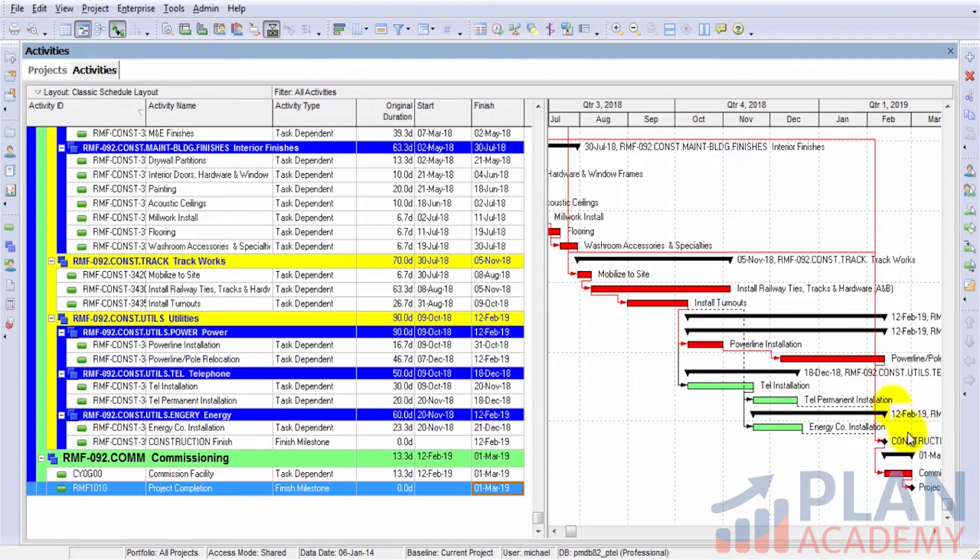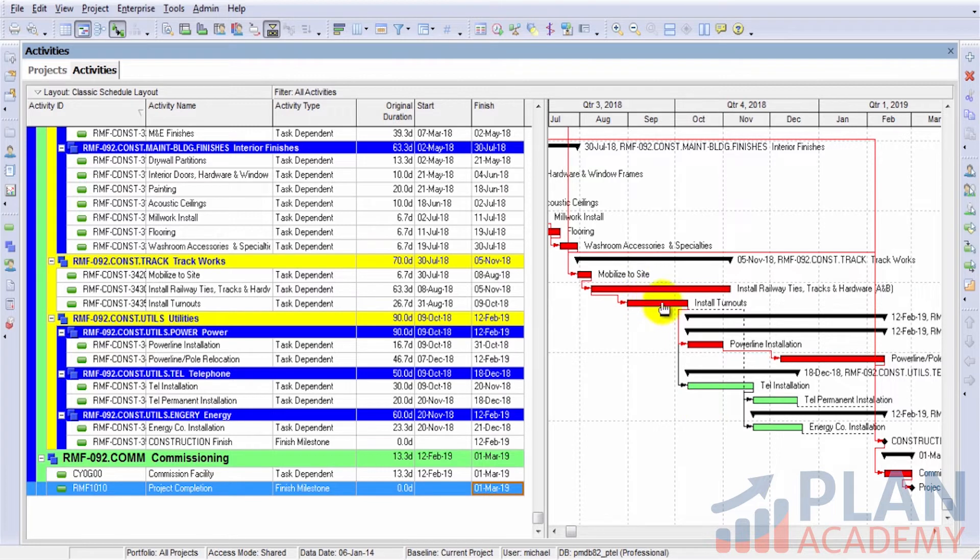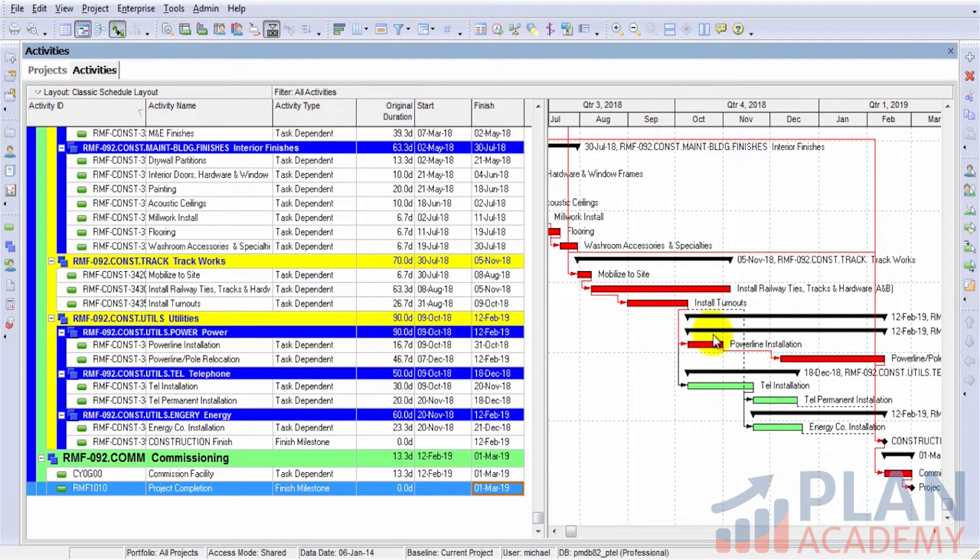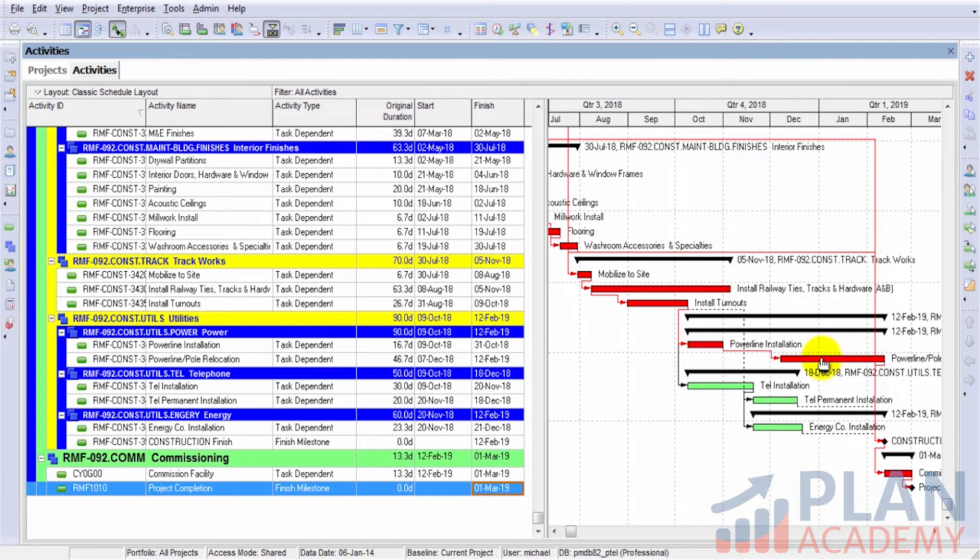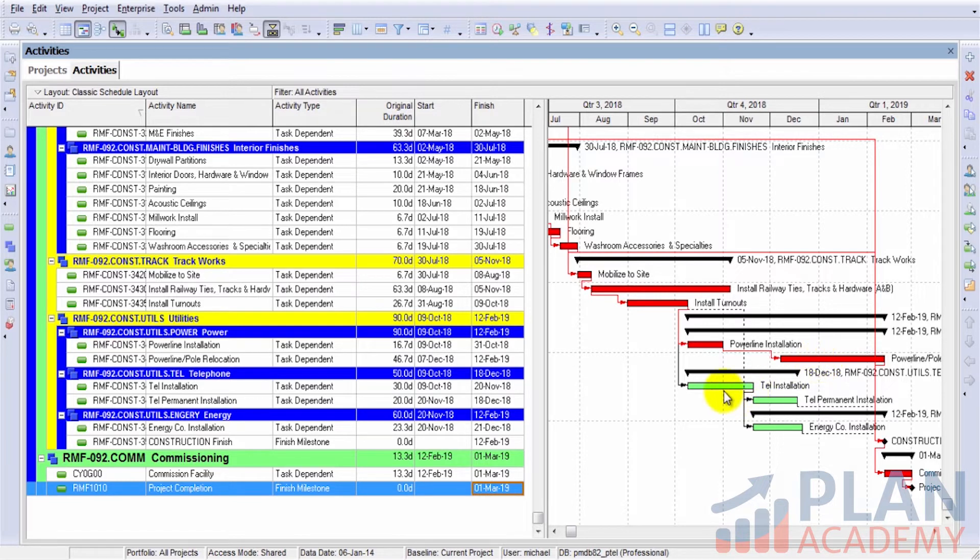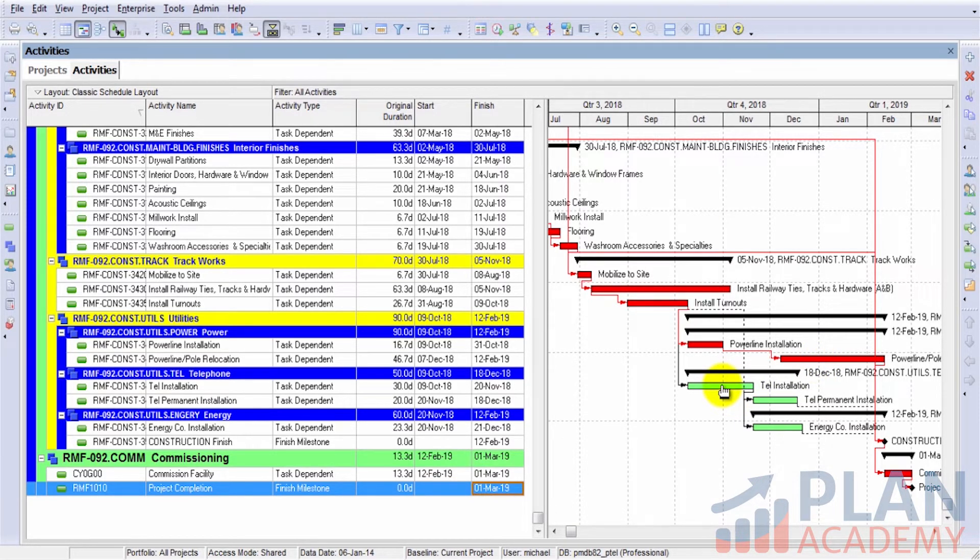Looking at the Gantt chart once more, activities that are in red, you probably have guessed this, are in fact my critical path activities. Any activity that is red is an activity that's on my critical path. Any activity that is green is an activity that has float or is not on my critical path.